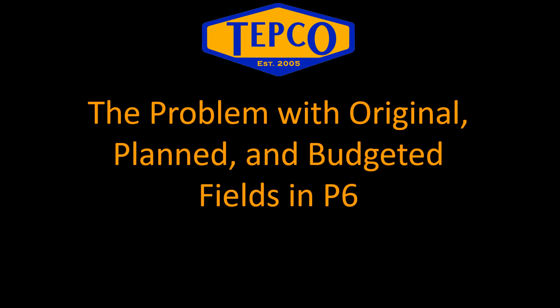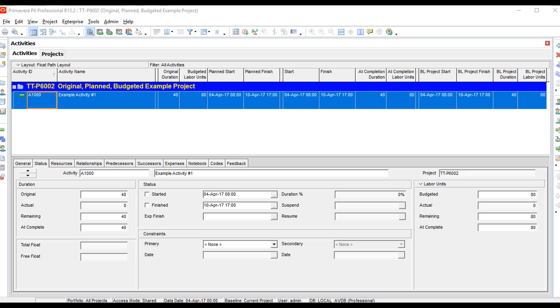These fields tend to cause quite a bit of confusion because people confuse them with the baseline. I have one example here in P6 of an activity, and I've broken the columns into groups. The first columns are the original duration, budgeted labor units, plan start, and plan finish — that's group number one.